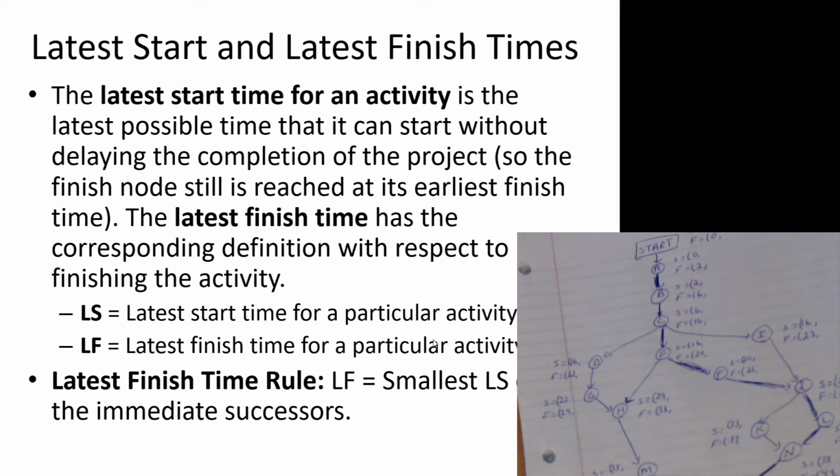So when we look at all the activities, we're determining the latest start and the latest finish for an activity, given that the project duration stays at 44 weeks. So, given that the project's still restricted to finishing in 44 weeks, what's the latest time a certain activity can end? What's the latest start that certain activity must begin at? So we're working backwards in this particular case.